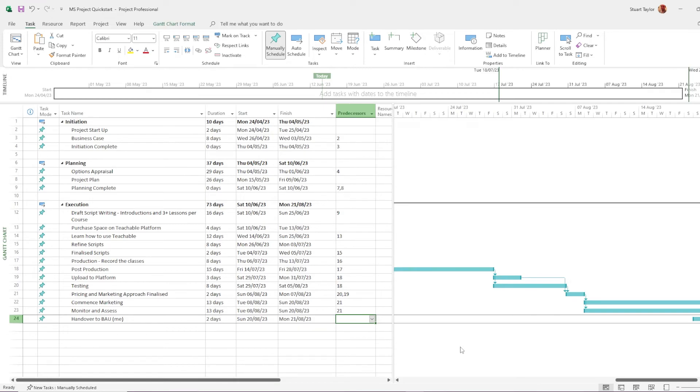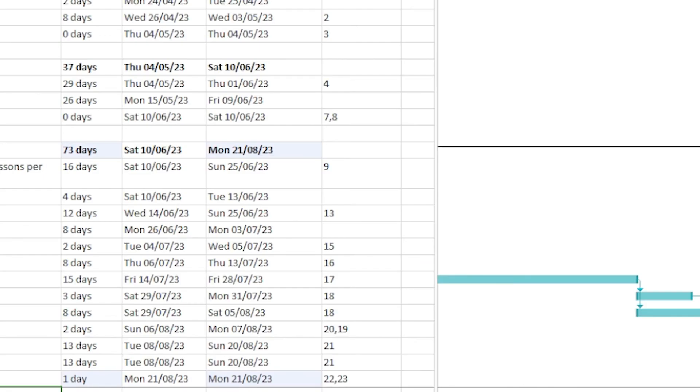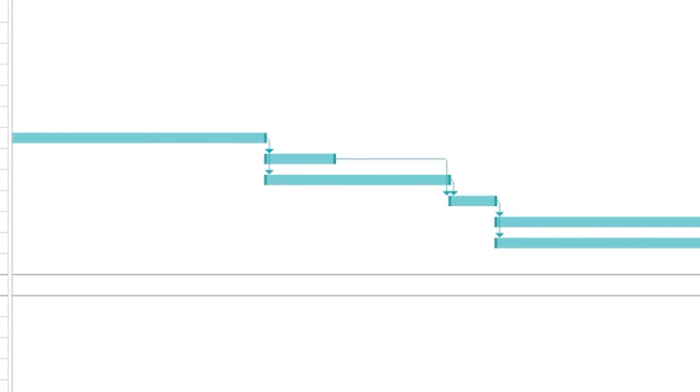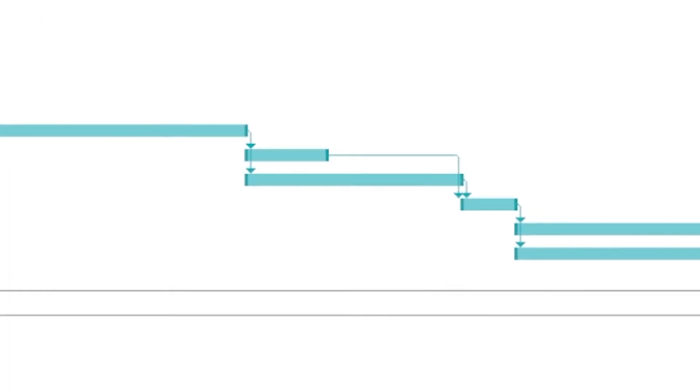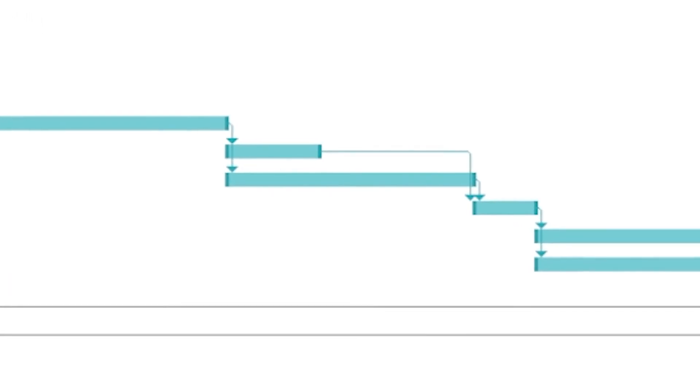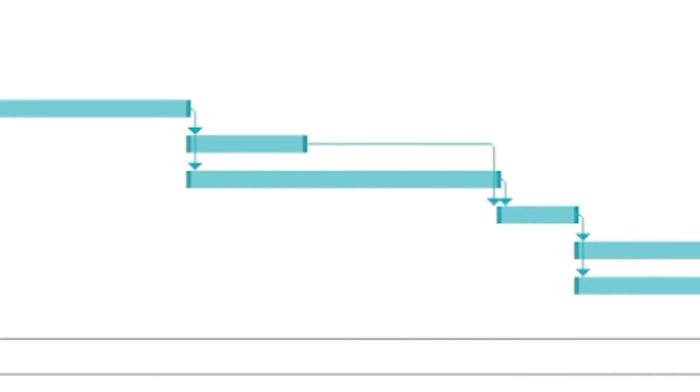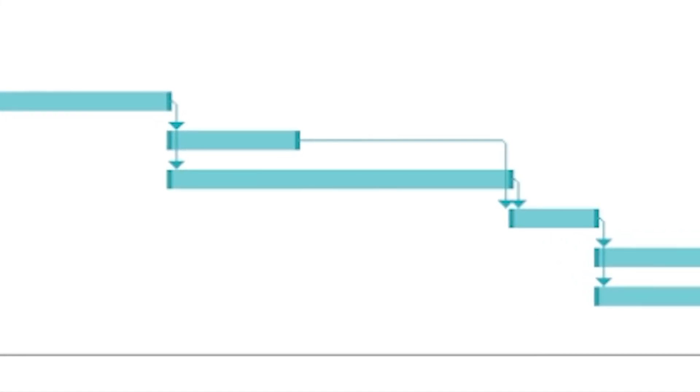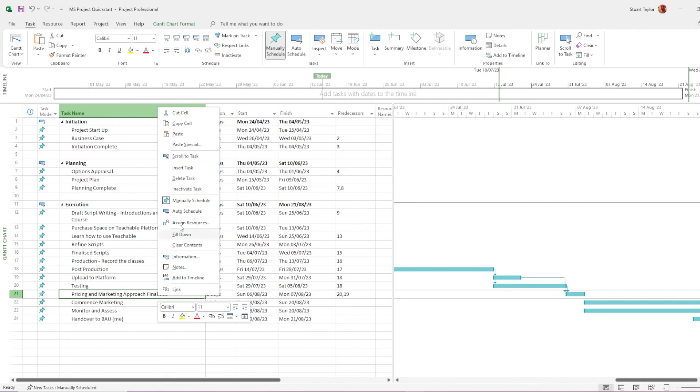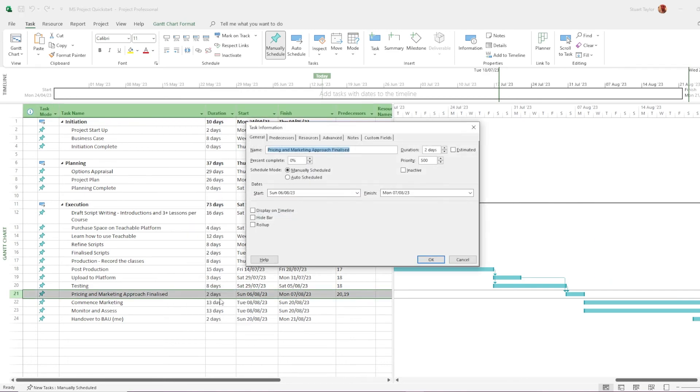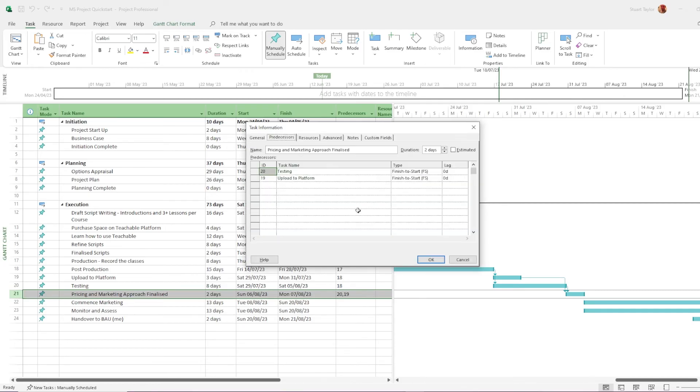Okay. I'm just completing the predecessors here. So I'm linking up all of the tasks that are part of the execution stage. You notice in some cases that I'm saying that tasks are dependent on more than one predecessor. That's absolutely fine. You'll notice that the task has two arrows pointing towards it. The task will commence after the last day of activity from its predecessor tasks. If you right click on any of the tasks and select information, you can then select predecessors from the task information and it will show you the details around all of the predecessors that are connected to that task.